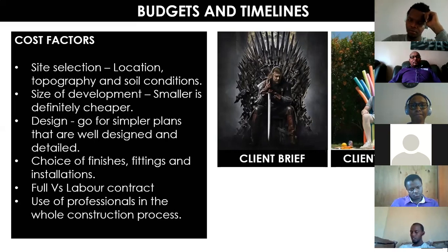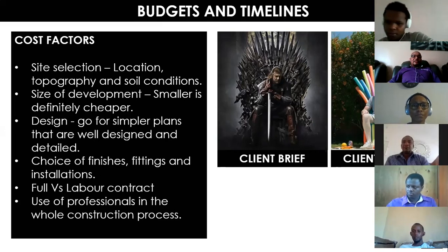Well, if you have the opportunity to do site selection, it's important because the site can really help in lowering your budgets. I talked about the soil conditions. If, for instance, you choose a site that has 2 meters of black cotton soil, and someone else chooses a site that has only 1 meter of black cotton soil, your costs of excavation and backfilling would be different. One would be double, the other would be half. So it's important when you're doing your site selection.